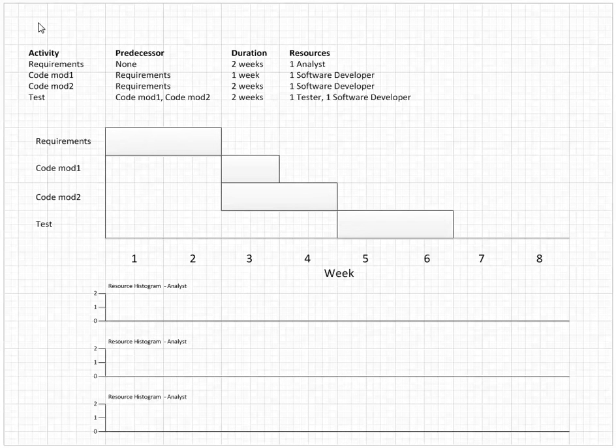Previously, we've talked about schedules and creating network diagrams and Gantt charts. But the way that we've been doing that is called resource unconstrained, which is to say that we assume that we have all the resources that we do to execute the project, and so the project length is determined only by the different activities, their durations, and then the predecessor and successor relationships between the activities.